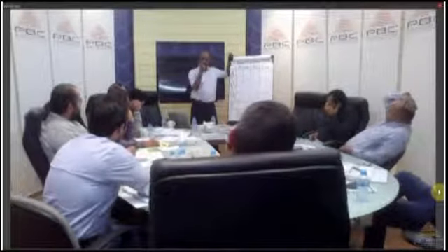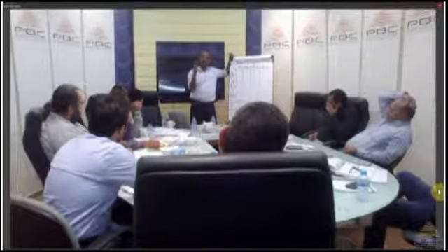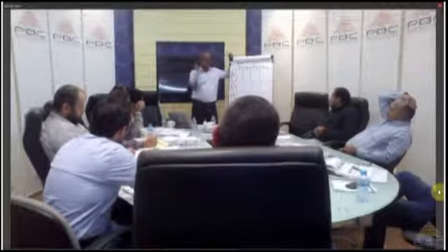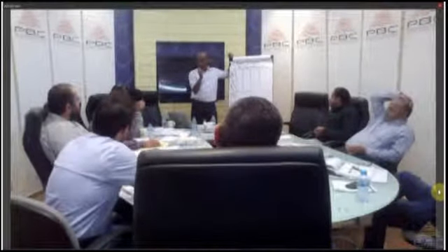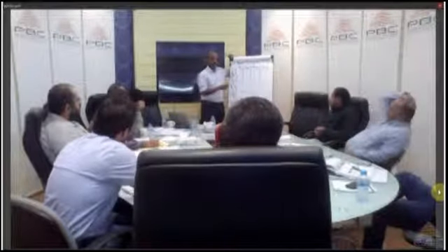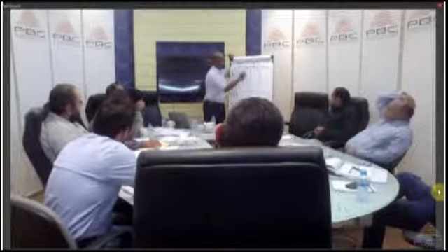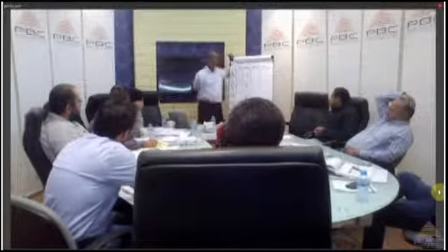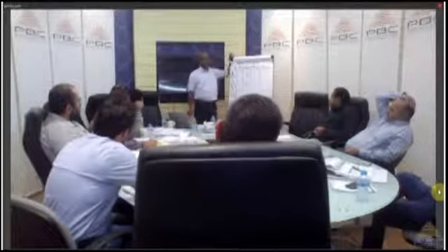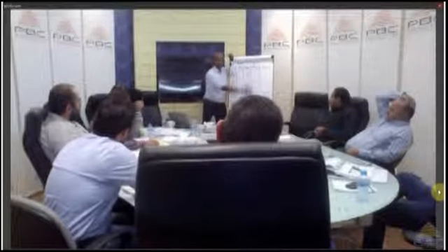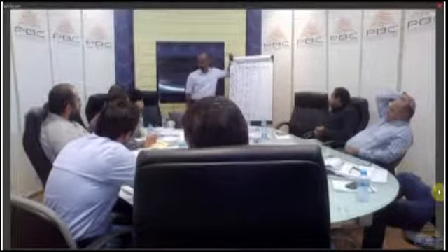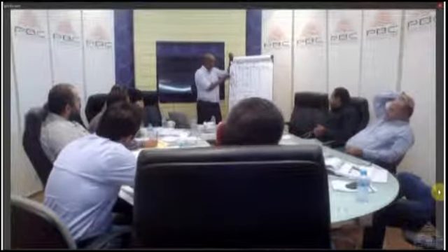project, you always need someone who is accountable for each task. Only one person, not more than one. Right? So I'm going to give the accountability in all processes to Ihab. Accountability means if anything goes wrong, he's the one we're going to go after. So I assign accountability, so Ihab is accountable all across.